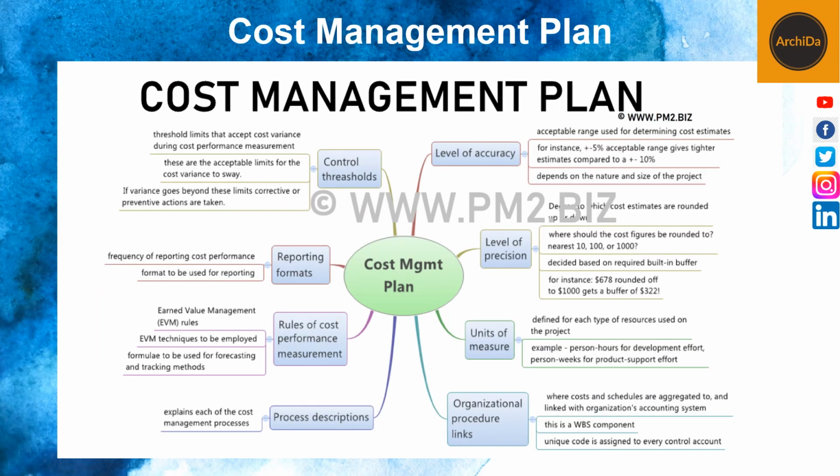A cost management plan sounds simple. It's an outline of the cost estimation for the project, but that includes all allocation and how the project manager will control those costs to bring the project in as budgeted. A cost management plan must take into account the resources that impact the project budget, whether materials or people. There are also fixed, variable, and overhead costs. All these must be calculated to know what your financial commitment to the project will be.